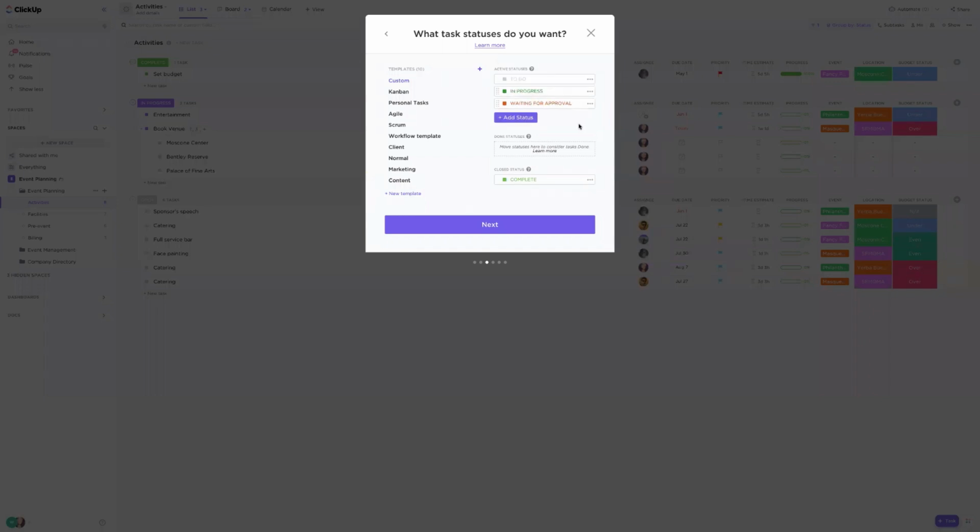And you may want to incorporate done statuses. So when a task is closed, that means it's complete, it's ready to disappear from view. But a done status could be quite useful in situations where maybe I'm pretty much done with my part on a task, but I'm blocked in some way by an external party, like a client or a vendor.